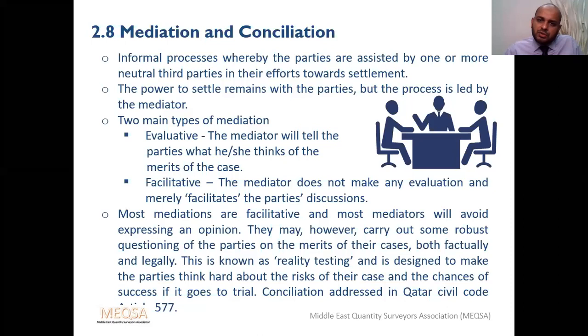But in conciliation, such things will also be done, and he will give his opinion as well, individually for the parties and in general. What is his opinion? These opinions are also accepted by litigation and arbitration. So it has some kind of validity. At least they will have a look.